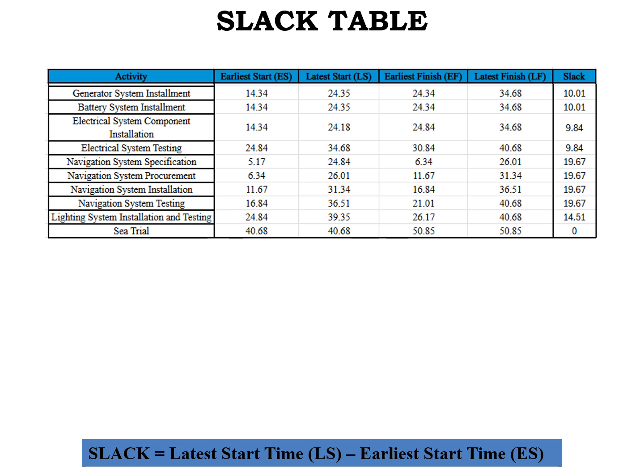So we are hoping to do sea trial within a specified time, which cannot be delayed. So every other system activity has to be done before the set time for our sea trial. So we can't move the time for sea trial. If not, it becomes critical. So that's the point of the slack. And this slack is calculated using the formula of the difference between the latest start time and the earliest start time.